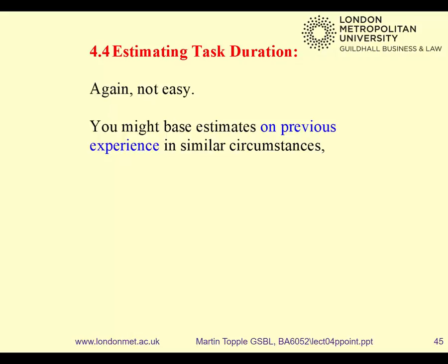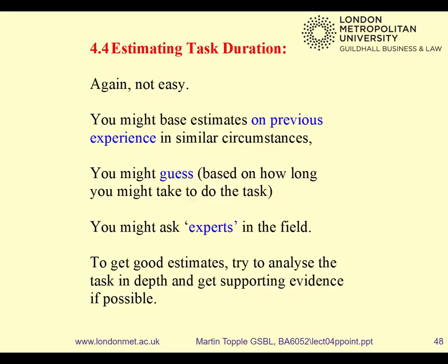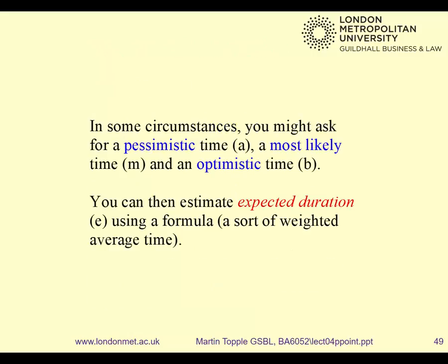Well, let's talk to the plasterers. Let's think about other jobs that have been done, and let's try and work out how long it takes. So experience on similar things, guess, or ask experts in the field to try and find out how long each of your tasks would take, given the assumptions you've made about resources and raw materials. And to get good estimates, you do need to cross-reference and look in other places to get supporting evidence for your assumptions about the task durations.